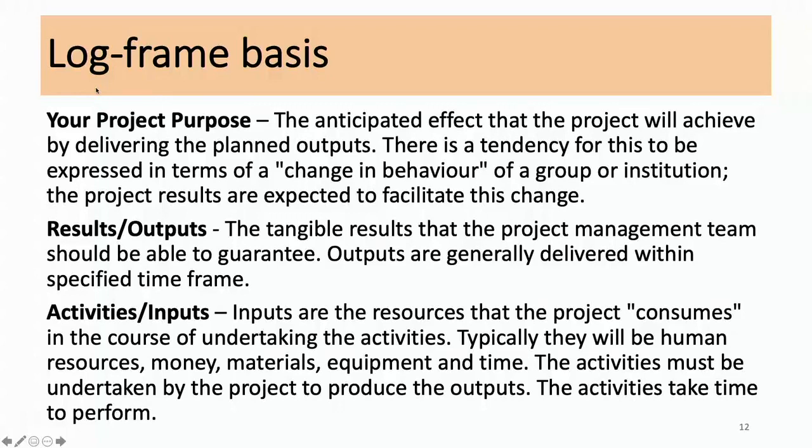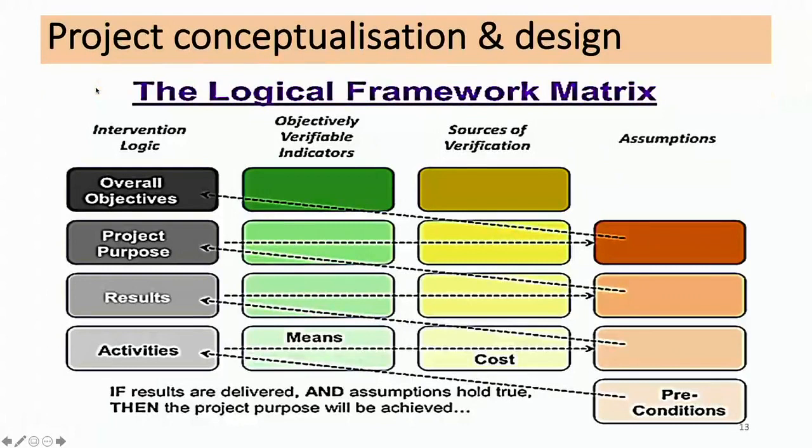Activities and inputs. Inputs are the resources that the project consumes in the course of undertaking the activities. Typically, they will be human resources, money, materials, equipment, and time. The activities must be undertaken by the project to produce the outputs. The activities will take time to perform, and this needs to be reflected in your project work plan.